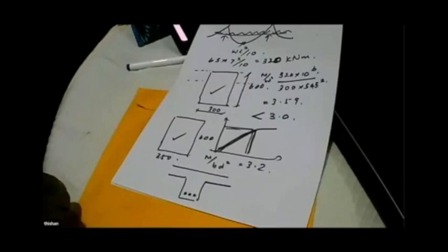Can you see how the numbers vary? If the steel is 245,000 with 18% VAT, what is the value a contractor will pay? You have to multiply 245,000 by 1.18. What is the value? 289,100. So something that the contractor gets for 289,000, a normal house builder pays 355,000.